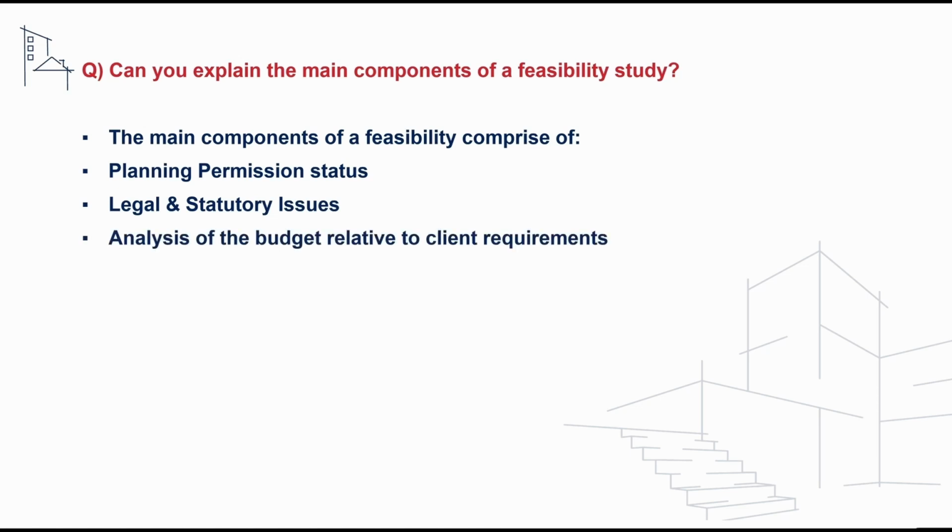We would expect an analysis of the budget relative to the client's requirements to determine whether the project remains affordable. We would also expect an assessment of site information provided by the client, and this could include geotechnical studies, ground contamination, availability of services, land easements and environmental considerations.